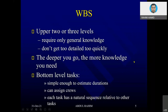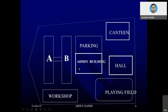For instance, constructing a floor basically consists of formwork, rebar, and then concrete — you can split them or put them together as one item. In any development there could be many buildings inside the area, and you can divide according to the building, because each building might have a different contractor or different people in charge, so it is easier to split them into sections.